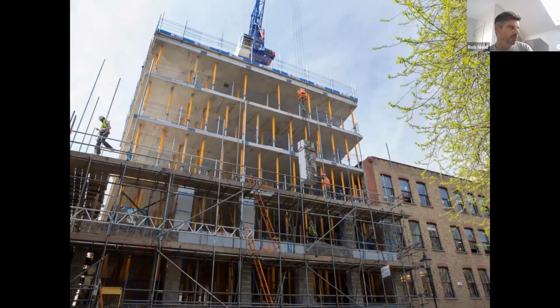It's essentially a reinforced concrete flat slab building, with an offset core to the rear to give it stability. The construction sequence was slightly odd and was kind of frowned upon at first, but the intention was to have one trade build up the concrete, back prop the lot, bring in the stonemason to put in the load bearing facade, stitch it all together, take out the internal props, and hey presto, it remained standing. That actually saved a lot of hassle and was a quicker program than just doing one floor of load bearing stone, then the concrete, then the stone, then the concrete.